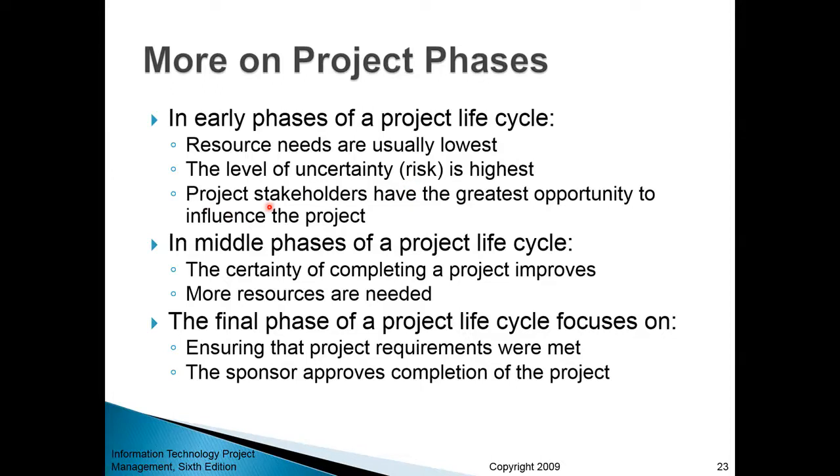And this is the phase where project stakeholders have the greatest opportunity to influence the project. This is the phase where all the relevant stakeholders need to submit their inputs, because after that phase, it's very costly and time-consuming to make any kind of changes to the requirements list or to the original scope statement.